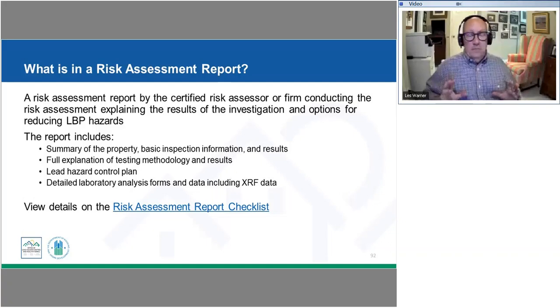So for a lot of your projects, I would think you may have sent out a program inspector who, let's say it's the HOME program, is going out looking at the written rehabilitation standards, and determining what, based on your property standards, needs to be addressed to bring that unit up to standards. But our risk assessment report will then handle the rest of this on identifying where there are lead hazards that need to be incorporated into the overall scope of work.